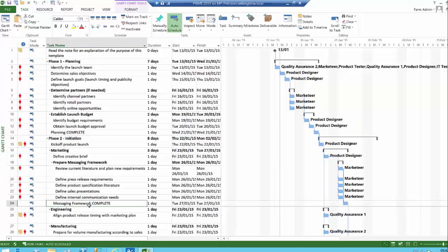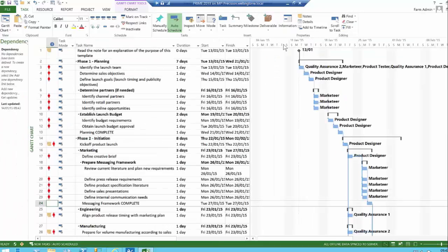So this task here will do, this is the 27th of January, so giving myself a little bit of slack there. The project is giving something to me, a deliverable on the 22nd of January, and I'm going to set it up here to receive it on the 27th of January. So I click up here again on the task ribbon, I click deliverables, and this time I click manage dependencies.